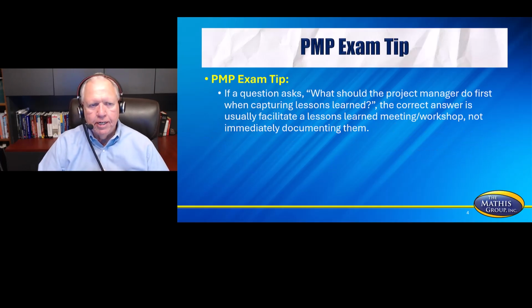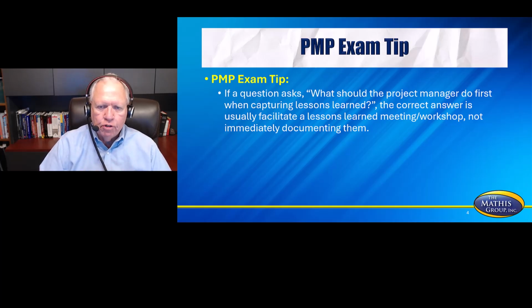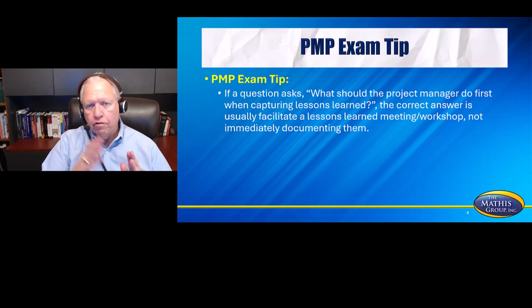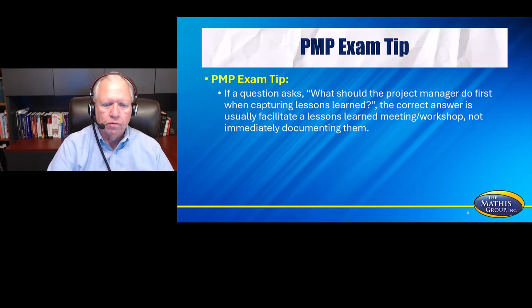Here's your PMP tip. If a question says, what should the project manager do first when capturing lessons learned? The correct answer is usually facilitate a lessons learned meeting or workshop and not immediately documenting them. The reason for this is so that you can understand the steps that you would be going through. Let me show you what I'm talking about.